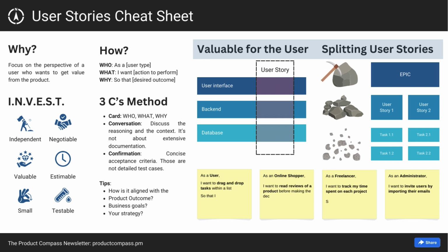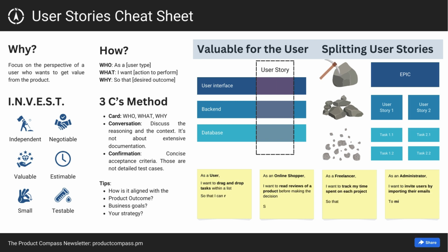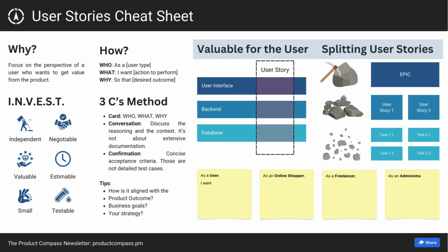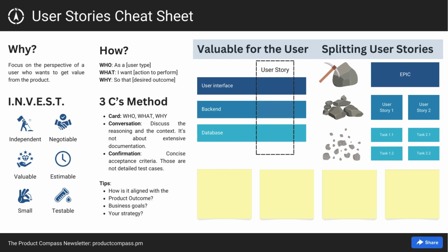Epic is a larger element, typically combining 5 to 15 smaller user stories, though that's highly context-specific. User stories are small, manageable items. And at the bottom we have tasks. They are used to plan and monitor the exact work performed by engineers. Product managers have nothing to say here. Some people add more layers, but in my experience, they overcomplicate things and do not bring much value.